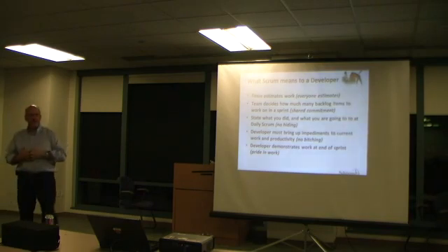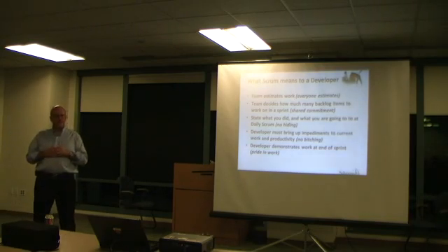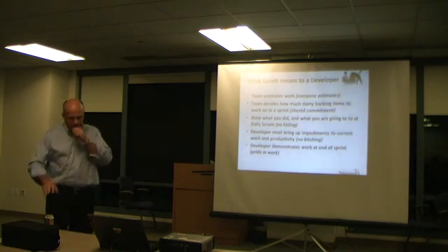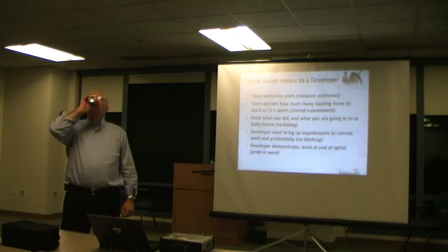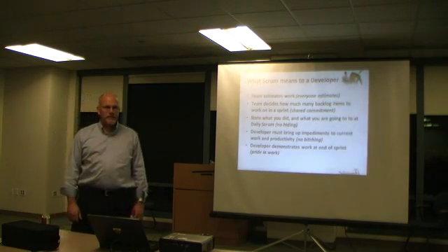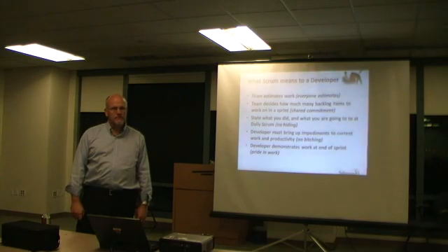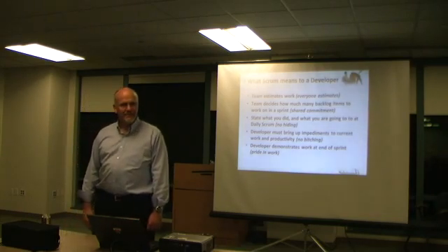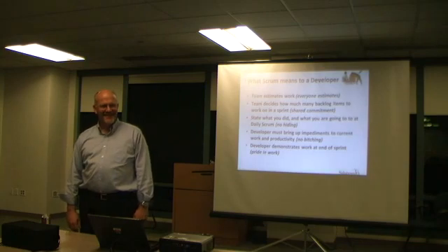And there's nothing preventing you from then taking that story. If you've got a 2-week sprint, so you have a story that's a 5-day story, there's nothing preventing you, for your own sake of sanity and progress and motivation, from breaking that down into a series of tasks. Okay, here are the 5 sticky notes that sit on top of the card that is in this spot, and we're moving these from left to right as we're making progress through them. Now pull things done and we can move on.